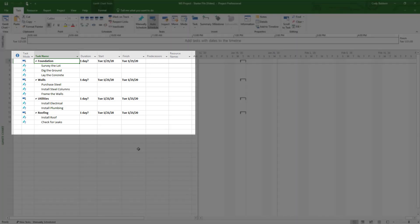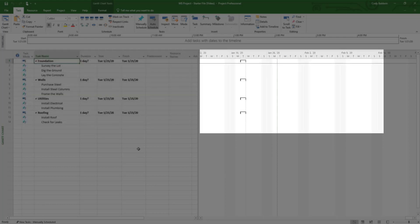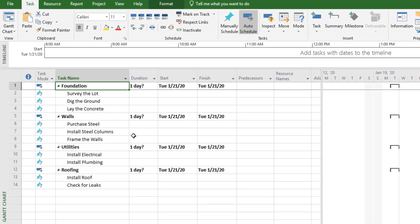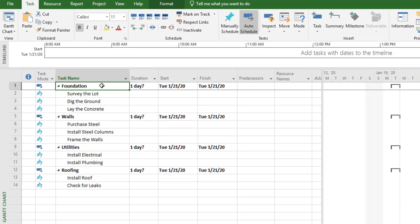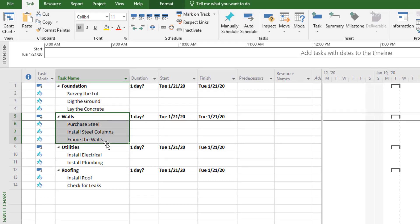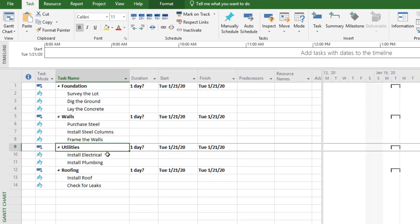The first thing you should know is that on the left side of the screen are your project activities — the work you plan to get done. On the right side is your Gantt chart, a visualization of your project schedule. On our factory project, we've grouped our work into categories — like the foundation, the walls, utilities, and so on.